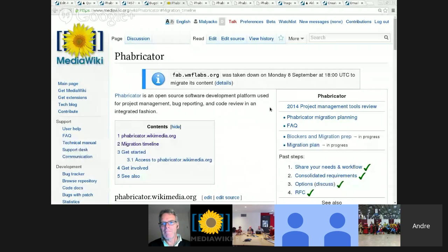Are you waiting for questions? I have tons more. Go ahead. So I was looking, it seems like projects can have multiple boards, but I looked at a few and none of them actually have more than one work board. So how does that work, and what would be the point of that? Projects don't have multiple workboards. Yeah, I myself am not aware that this is possible. You would have, for example, sprints as projects, and they can have a board. But as far as I know, you cannot have several workboards for one project.